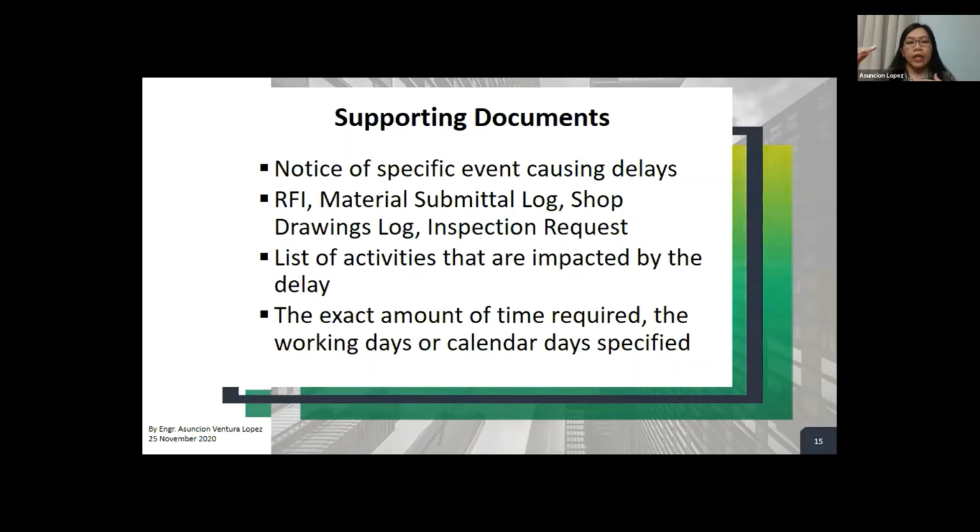So you can just make a summary of that and then make it an appendix 1, attachment 1, or however you call it. Now you must have the exact amount of time required. The working days or calendar days must be specified. So take note of these. Don't just write days, 42 days, 30 days. If you will be using days in the rest of your report, make sure that you have defined what days is at the start of your report.